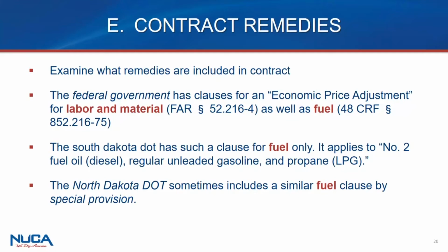I mean, if you've got a pre-bid conference and you've got a whole number of contractors in the room, as well as ideally a supplier with you, to the extent that you can then bring up, hey, we've got a problem with availability of materials, as well as huge cost increases. And if you got a room full, there's an opportunity to say, for the generals that are here, the subs that are here, the suppliers here, are we all in agreement on that? Okay. So, that can give greater momentum to the notion of trying to get something equitably done by the owner going forward, whether it be at the pre-bid, the bid phase, or otherwise during the build phase.